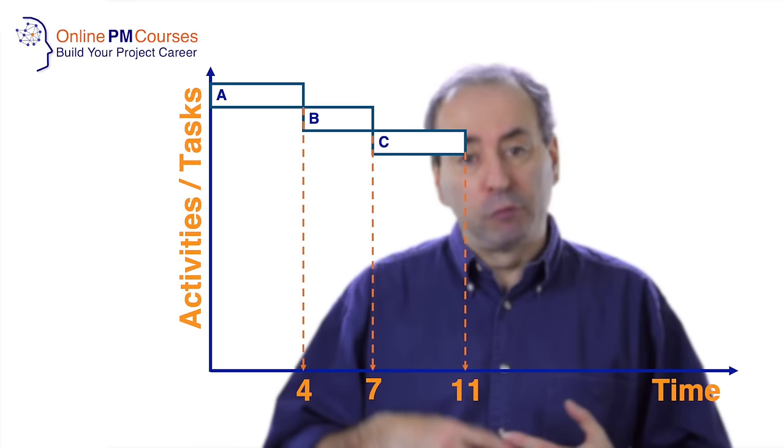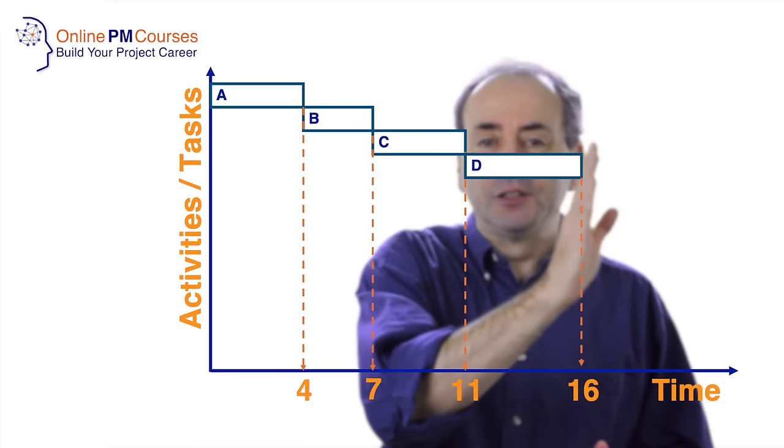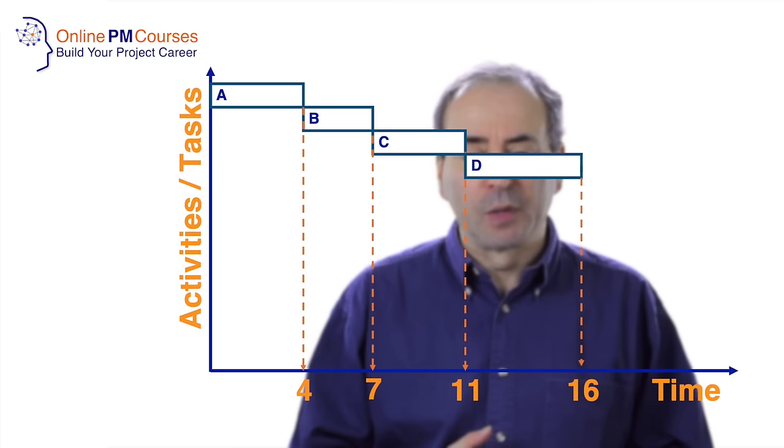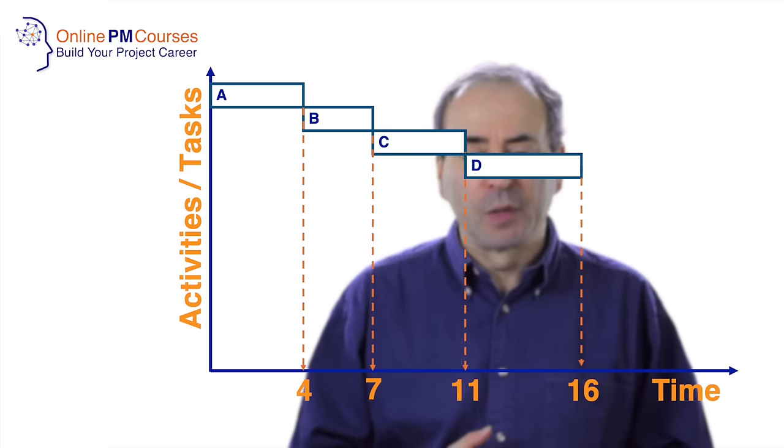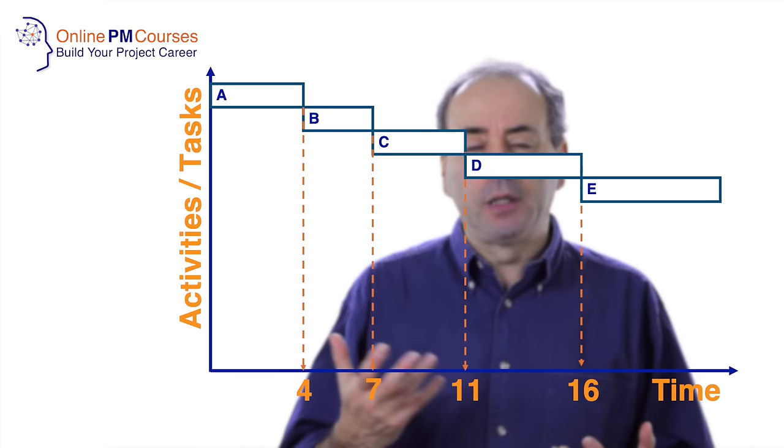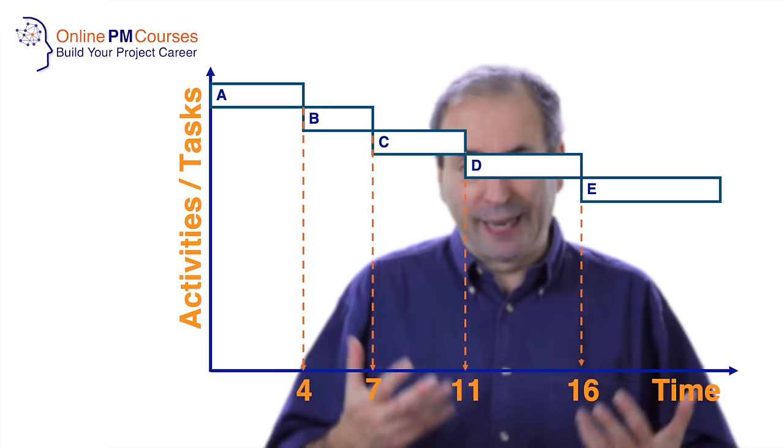So if one task follows another, then the bar follows the previous bar. And so what we often see on our Gantt charts are these long diagonals of one activity following another in time, because each task is dependent upon the completion of the predecessor task to get started. But then we might have other work streams that run in parallel.